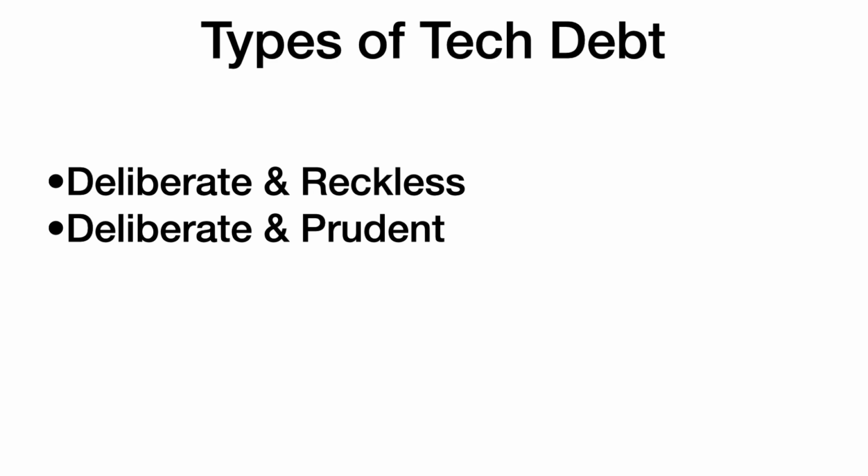That means you have a proper backlog where you have created all your stories and tickets to refactor the code, to write all the test cases, or to put everything in a proper format that you would have done if you had been given proper time. So in this case, the chance of missing anything is very low or negligible because you have everything planned. You have your Confluence page, you have your Jira ticket, everything ready for that.